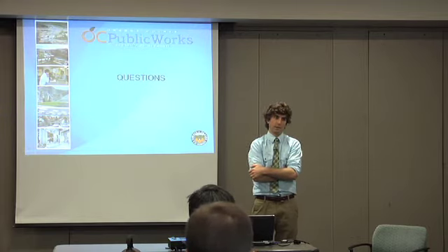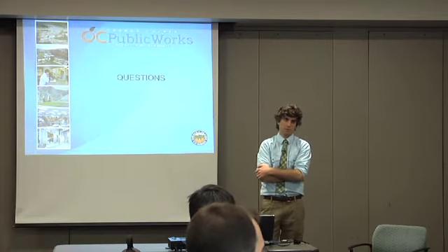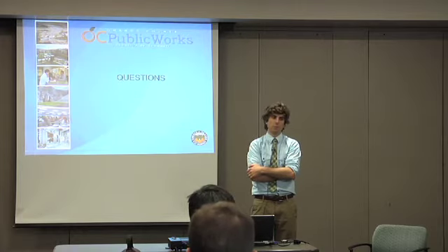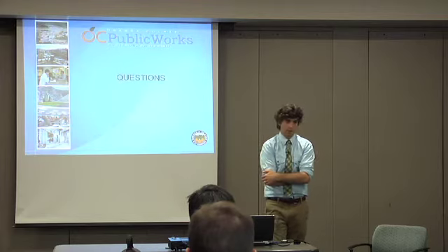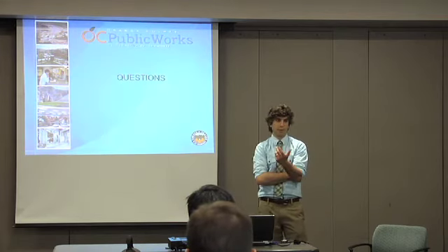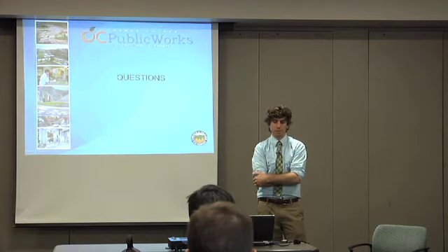Signing and stamping. Yeah. Basically, for the source report part of the WQMP, and every grading plan, we require that the source engineer also sign, not just the civil. Oh, okay. Yeah, that's a good practice. I think that's something that's nicely transferable, that they've signed the grading plan to certify that the sizing they've required in the WQMP is actually being provided. Yeah, I like that. If it is two different people, that makes a lot of sense.